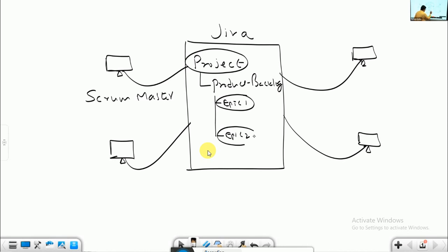Another major business requirement, when you talk about the customer model in the same banking product: customer should be able to make the money transfer. Or admin should be able to create and manage employees of the bank. These are called epics. Under one epic, under one business requirement, we can have multiple stories. Stories meaning the functionalities planned to implement in the product.